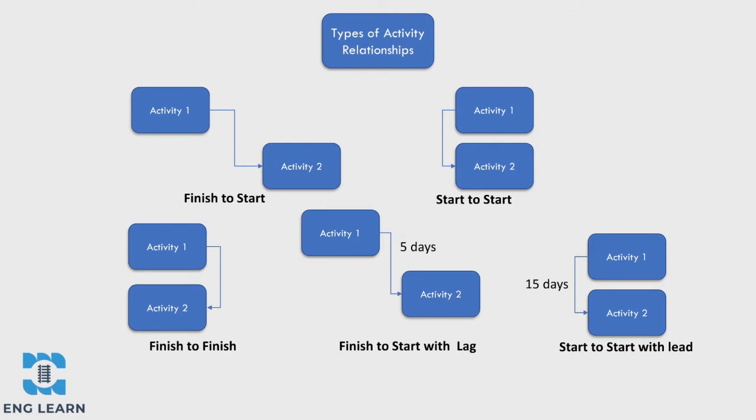If we look at the diagram, that basically means that activity 2 can't begin until activity 1 is completed. Examples of this might be asphalting on a road project can't begin till the earthworks are complete, or construction can't begin until design has been completed.